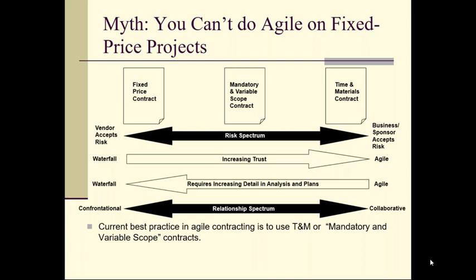And we may price in some stuff that we understand, like if you want hardwood floors on the executive level, here's the cost of hardwood floors. If you change your mind and you want porcelain tile, here's a price for doing it that way. If you change your mind and want carpet, here's the price for this grade of carpet. We can provide some options, and the client chooses later which ones they want. We've already priced in a certain number of, we'll call them points worth of work, and those points are loosely associated with dollars. So we can come up with a budget for the fit out, and they can choose which items they want as long as it lives within that budget.